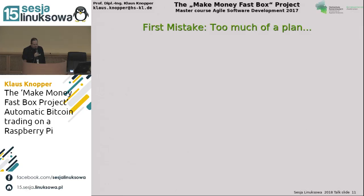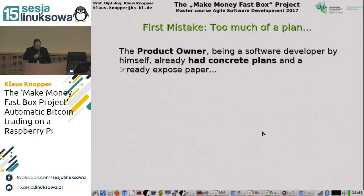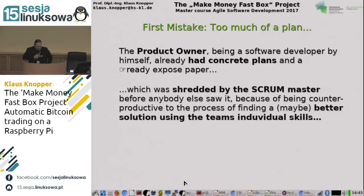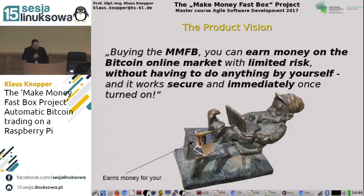We very early reached the state where we decided everything must be open and changeable by the public. My first mistake, being a developer myself: too much of a plan. I already had concrete plans and a ready exposé paper, happy to deliver it to the students. This was then shredded by the scrum master in anger, because it would be counterproductive to finding a better solution using the team's individual skills. He said: just give the idea, no concrete implementations — just what do you, as product owner, expect this box to do? Which is kind of hard for me, as I always try to give technical recommendations. So we started with a new product vision.